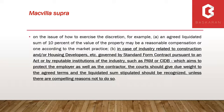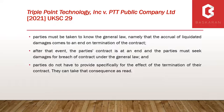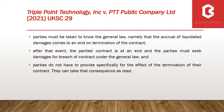Interestingly in Mac Villa, it seems recognised that if the LAD clause is in a standard form of contract like the PAM contract, the courts would give due recognition to that and would in all likelihood allow that liquidated damages sum. Apart from that, there is a reasoned judgment from the UK Supreme Court in Triple Point: damages may be recovered right up to the date of termination, but beyond that, general damages would need to be proved. The Supreme Court emphasised that liquidated damages running from the completion date to the termination date is an accepted position that does not need to be expressly provided for in the contract.